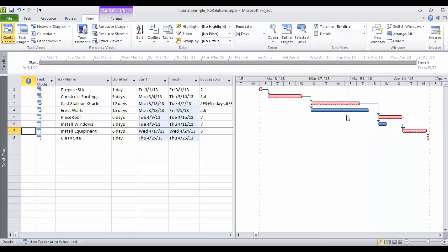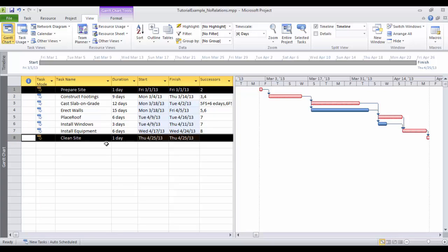So for example, some would notice that there are some site work activities and building activities. What I will need to do now is group the first and the last one. Even if they are chronologically done at the beginning and at the end of the project, as grouping, it makes sense to say site work includes preparing the site and cleaning it.